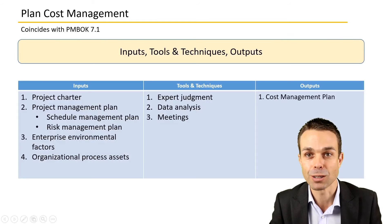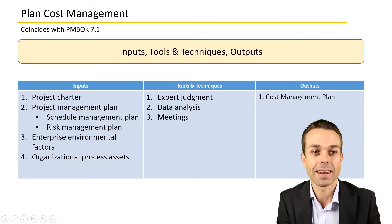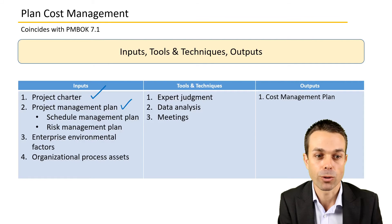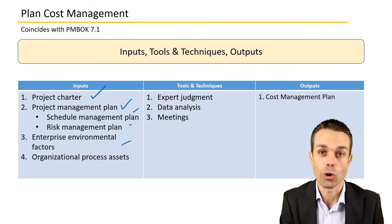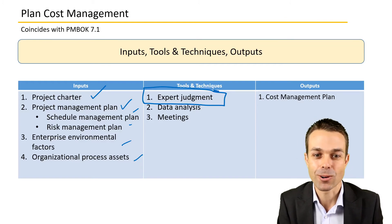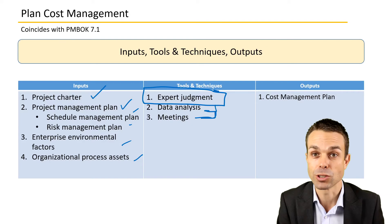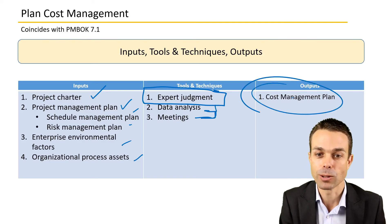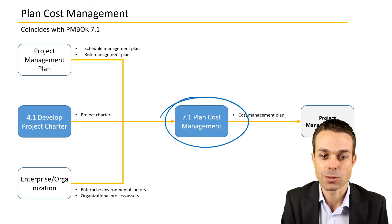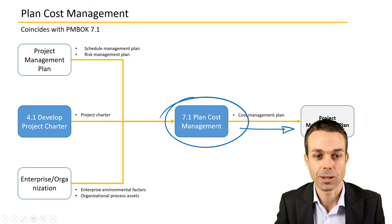For inputs, tools and techniques, and outputs of Planning Cost Management: we have our project charter for the high-level view, the project management plan for more detailed implementations including the schedule management plan and risk management plan, EEFs and OPAs. Our tools and techniques include expert judgment, data analysis, and meetings. The output we're looking at is the cost management plan itself, which feeds back into the project management plan.